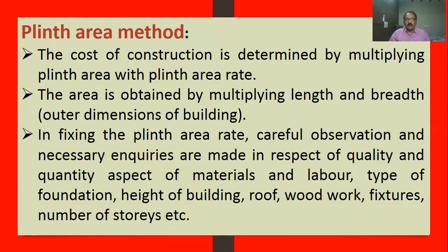The cost will vary with height. If 3 meters is the height, one cost. If 3.5 meters, a different cost. So these observations are made in the plinth area method. What is the roof, slab or shed? Type of roof, woodwork, teak wood or ordinary wood, and number of stories.